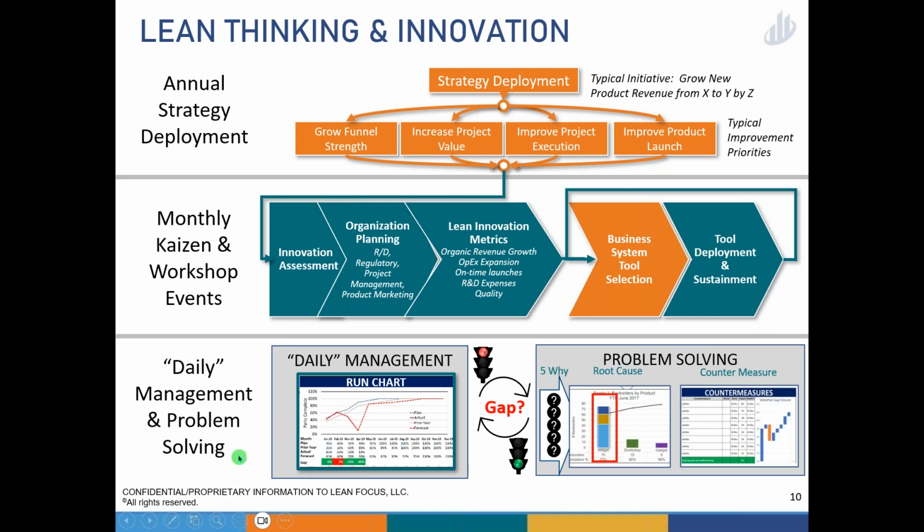And then finally, I'll say it also fits into daily management, because what you're creating here is your overall hypothesis for the whole project about how you're going to incorporate features and how long it's going to take you to develop this project. So this workbook becomes your hypothesis, and now you can measure against it every week. How am I doing? Where are the gaps between what I said I was going to do last March and how I'm doing today? And when I see gaps, I have the opportunity to come in, problem solve, and close those gaps. That is the most unnatural thing for engineers, as far as I can tell. They don't think of the world that way. They tend to think, oh, my project slipped, too bad, it's going to be late. Projects are always late. This is a great way to say, no, as soon as we see a gap, we're going to jump in and actually fix it.